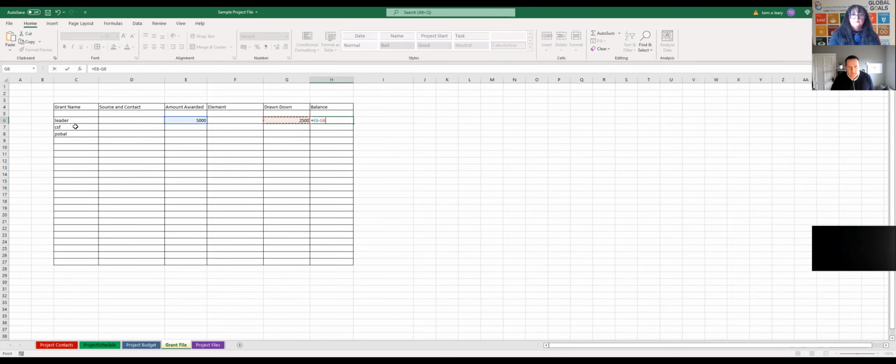So what would you do there? Basically, if you're meeting with a client, or if you're dealing with your committee and you're going back with a report saying, okay, the project's going really well, we've drawn down 2,500 of the grants for, let's say, fit out. We've been onto the builder. There's about another $3,000 left there to use in fit out. We've only got 2,500 of a grant left. That means we're going to be short 500 euros.